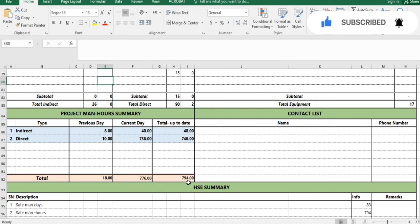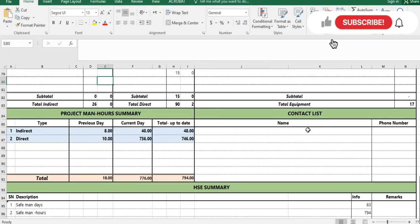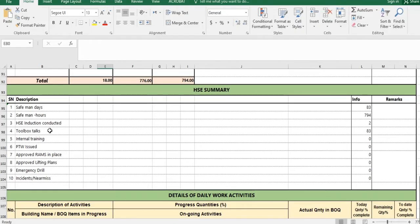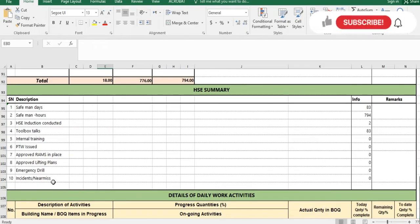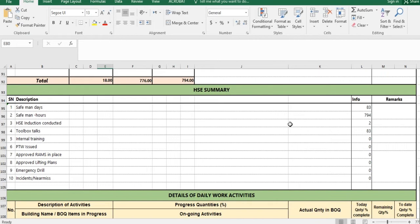If there is a contact list from the subcontractor, you put it here. The safety section covers the HSE department data: man hours, HSE inductions conducted, toolbox meetings, internal training, emergency drills, incidents, and near misses. Data for this section is provided by the HSE department — you get it from the safety engineer or safety officer and update it daily.